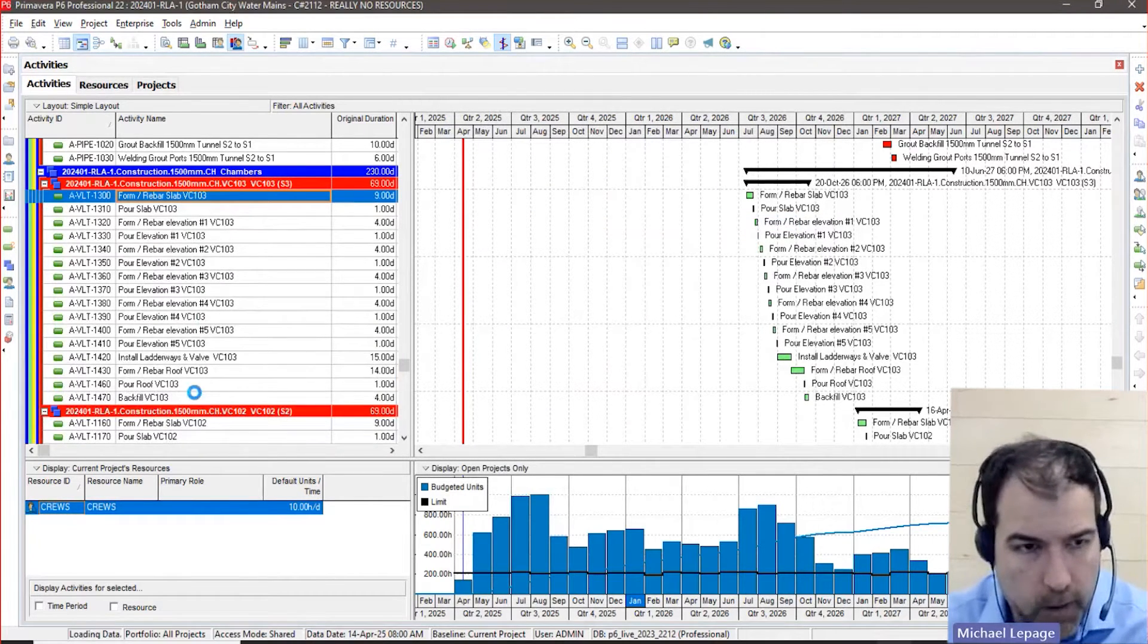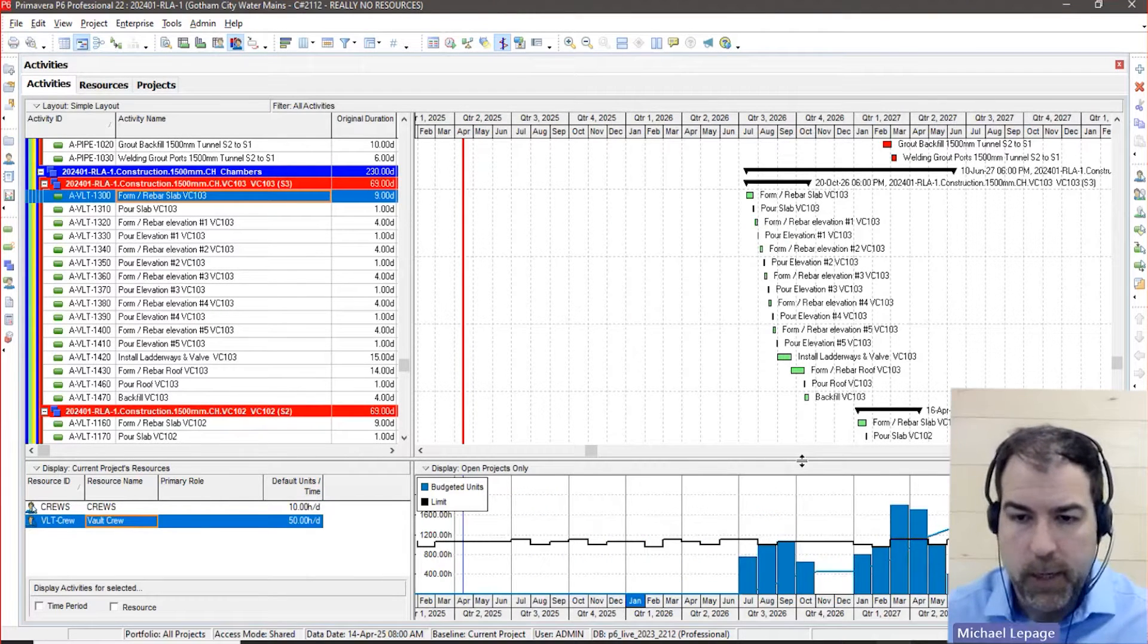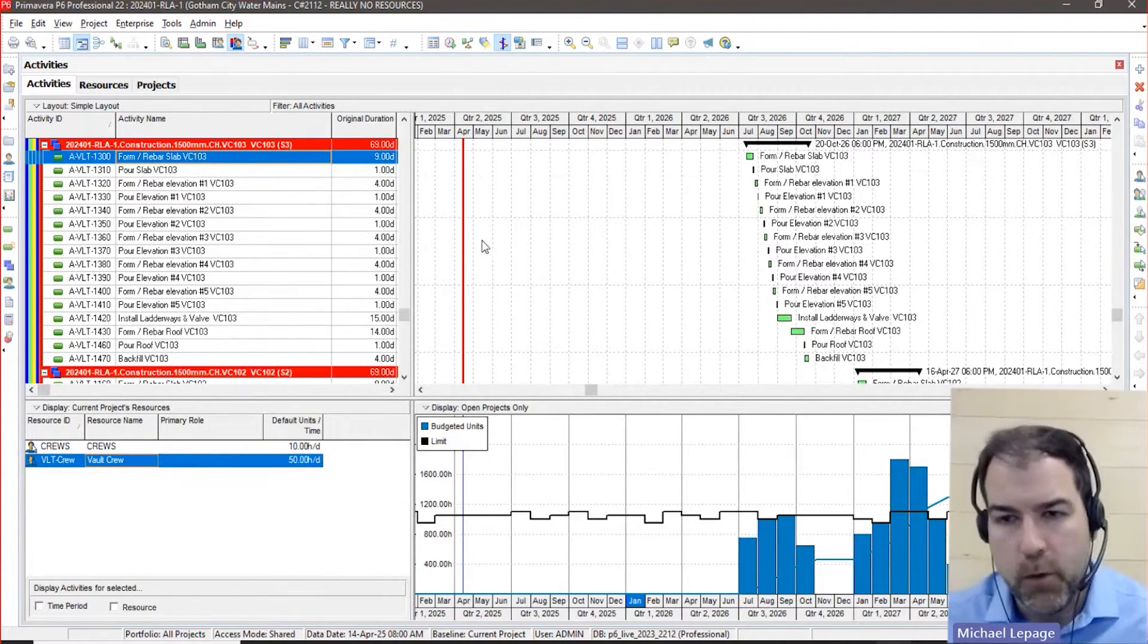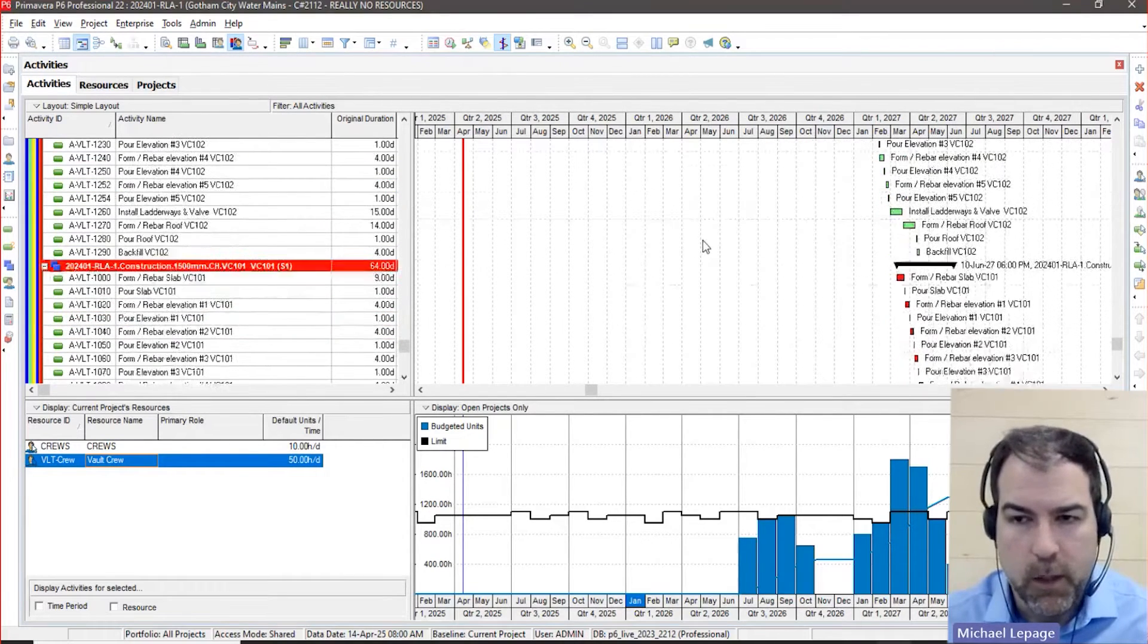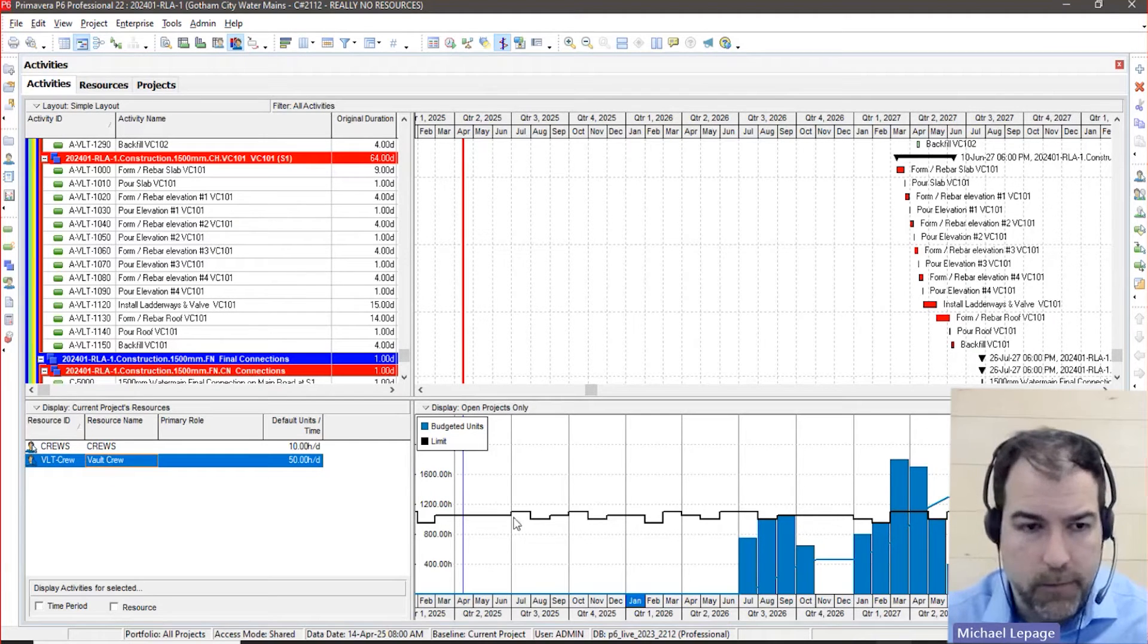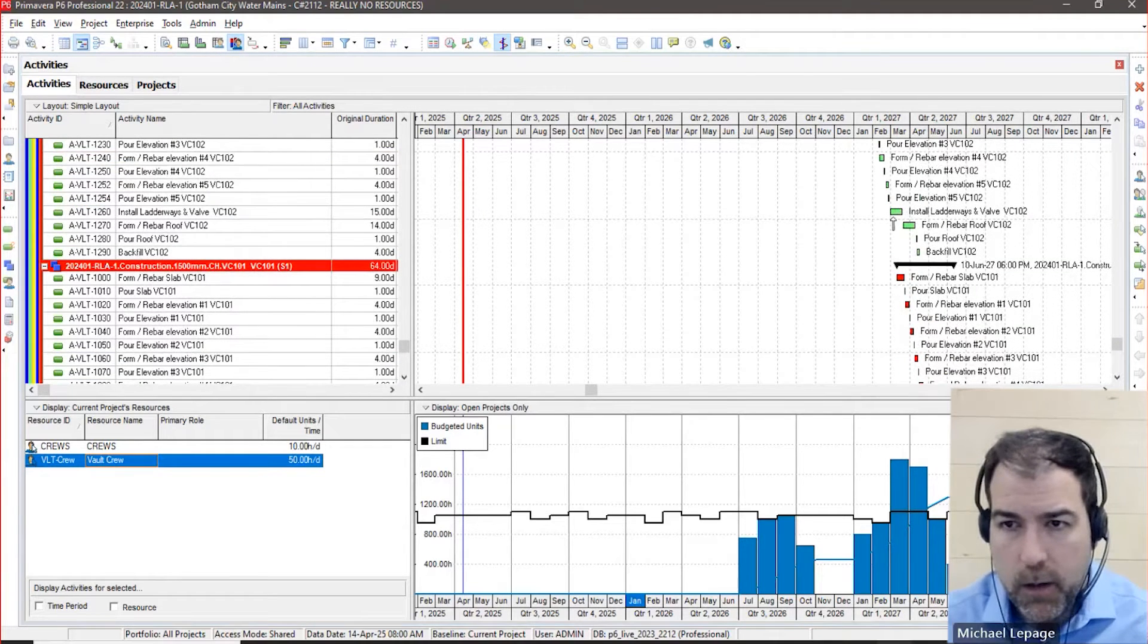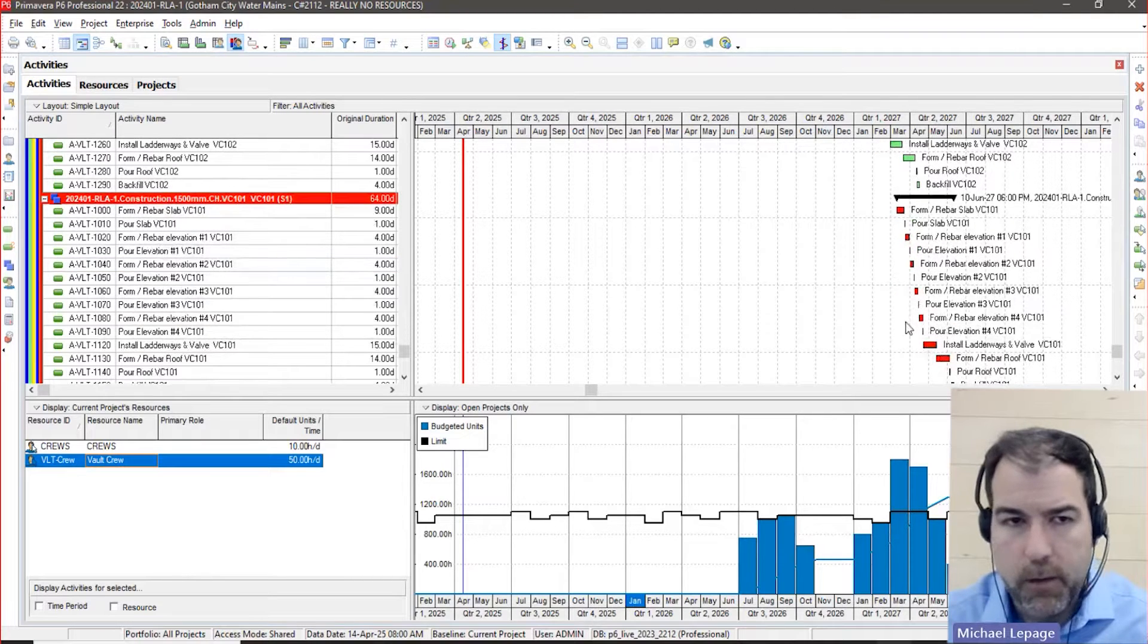And if I hit F5, I get the graph. It didn't take me a long time and you can do it with unactualized work. It's kind of the best. You won't be able to do it with actualized work. But right there, if I look at my vault crew, let's say I only have one. Oh look, I've got overlapping work. Again, I can see here I've got two vaults, two bits of work that are overlapping.